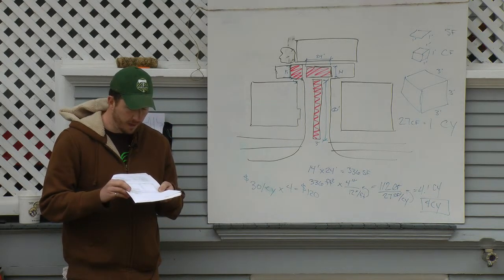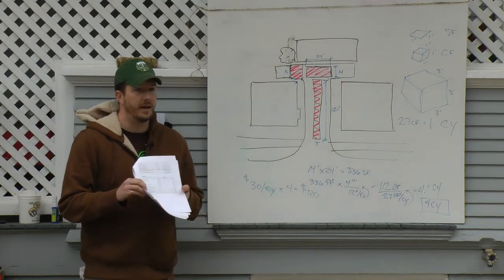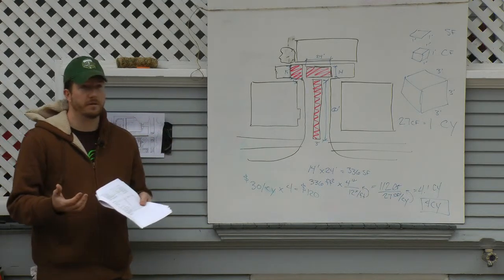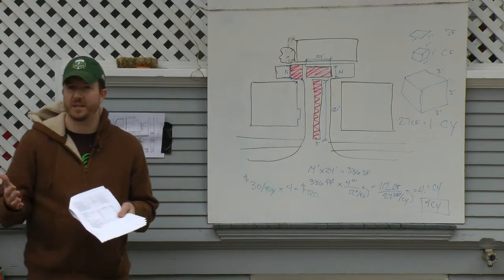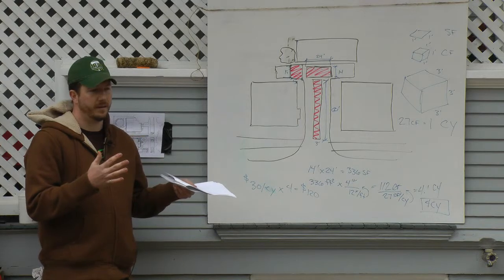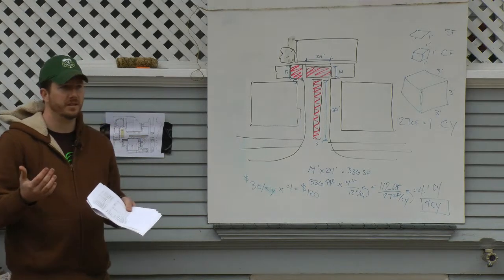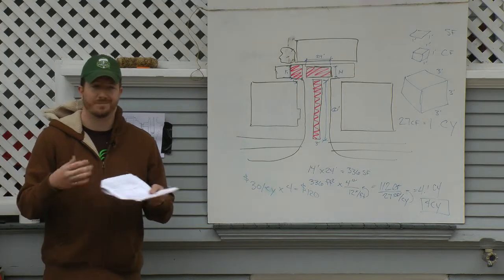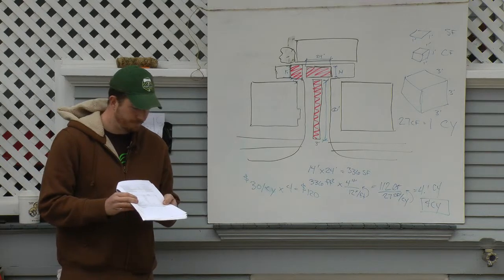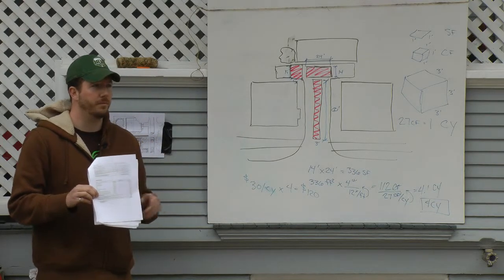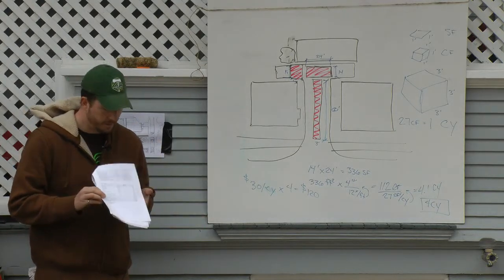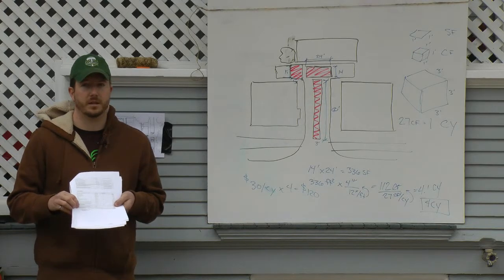And then permits, if you have to permit it, I would go somewhere between 3 and 5%. Or if you wish, you could call BDS, the Bureau of Development Services in town, and they can help give you a gauge. Most of the time, permits are based on the amount that you plan to spend on the project. They call it the project valuation. So you'd say, it's going to cost this much, and they would say, okay, in that case, we'll charge you so much. In our case, we didn't permit because we aren't moving 10 yards of soil, and we aren't affecting over 5,000 square feet. So we said 0 there. So that came up with our total project cost.